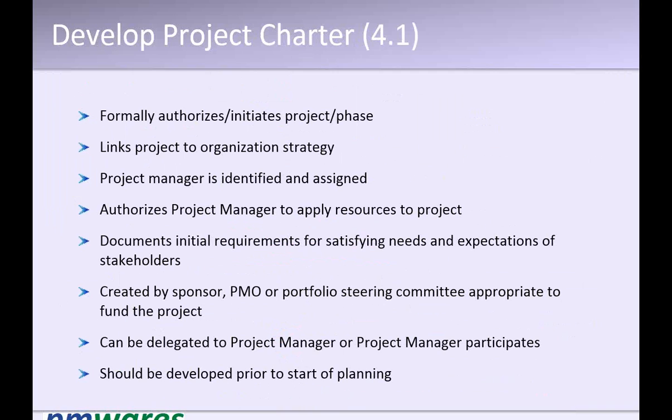Then you understand what is actually the direction given in the law. The new regulations will all become very specific requirements for this project, that this project must comply with. So they are requirements for the project. In this case it is not an environmental factor because that is the reason for the project. This change in regulation is actually the business case for this project.